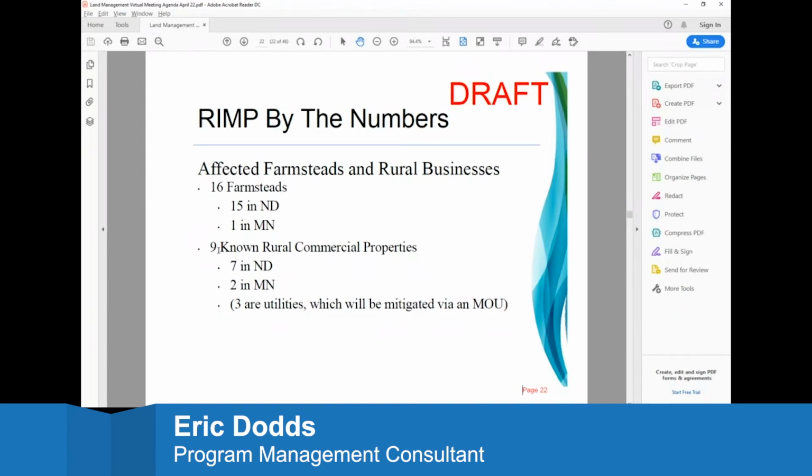Yeah, I would anticipate that we would sign an agreement. I guess the details of this do need to be worked out. I have talked to Mr. Shockley, and he's informed me that he's been involved with several of these type of forgivable loan programs. And so there's some successful history recently in the local area with using this type of model. And so I guess the exact details of that agreement need to be ironed out. But in my mind, we would have an agreement with the displaced property owner that lays out the terms and conditions of the forgivable loan, and assuming that if they're operating a farmstead today, and assuming that they continue to operate the new or just the reestablished farmstead for a period of time, then the loan would be forgiven, in a ratcheted or step down type fashion.